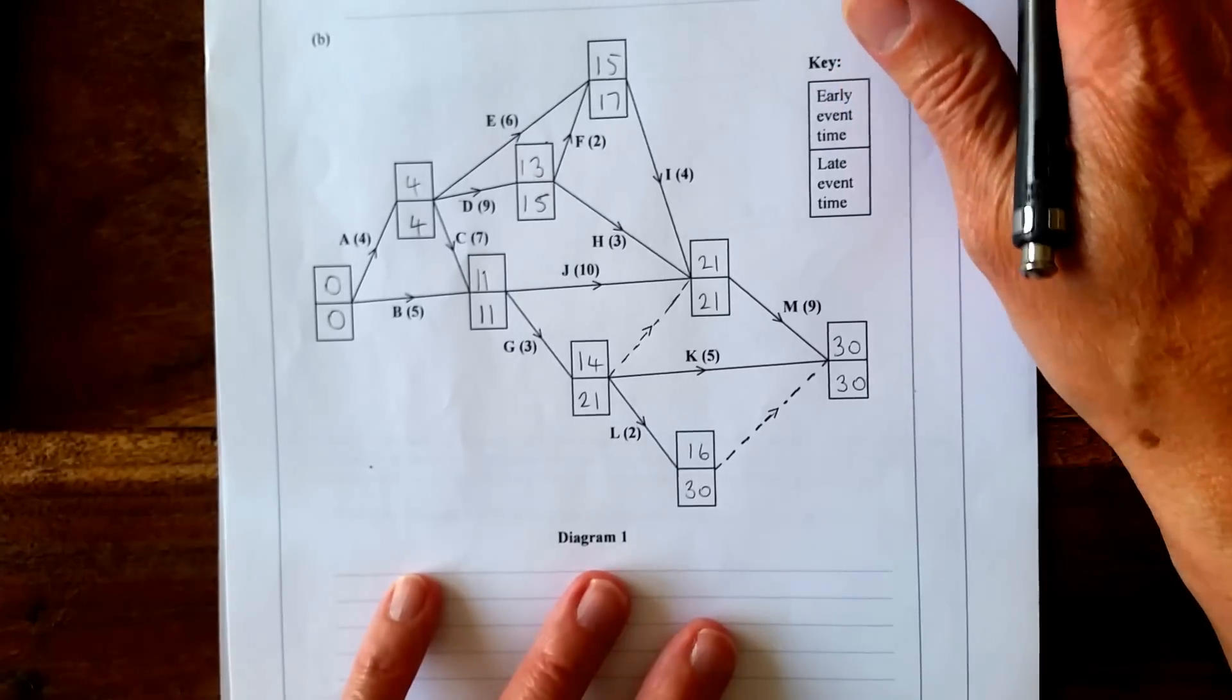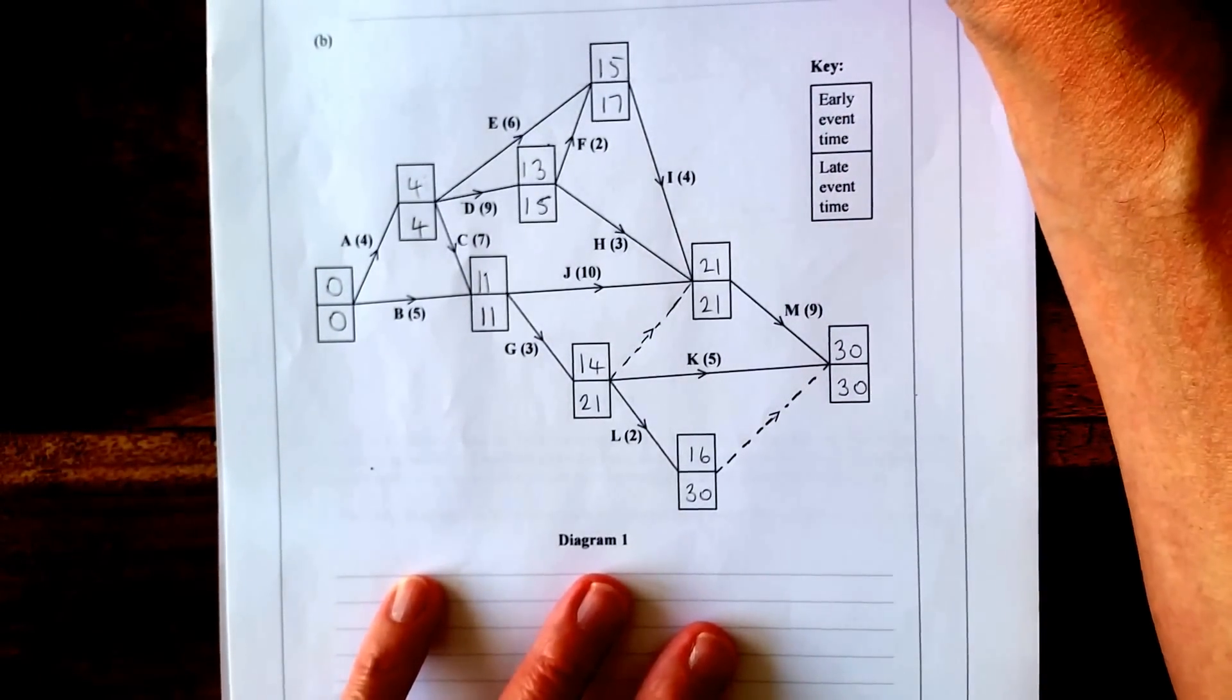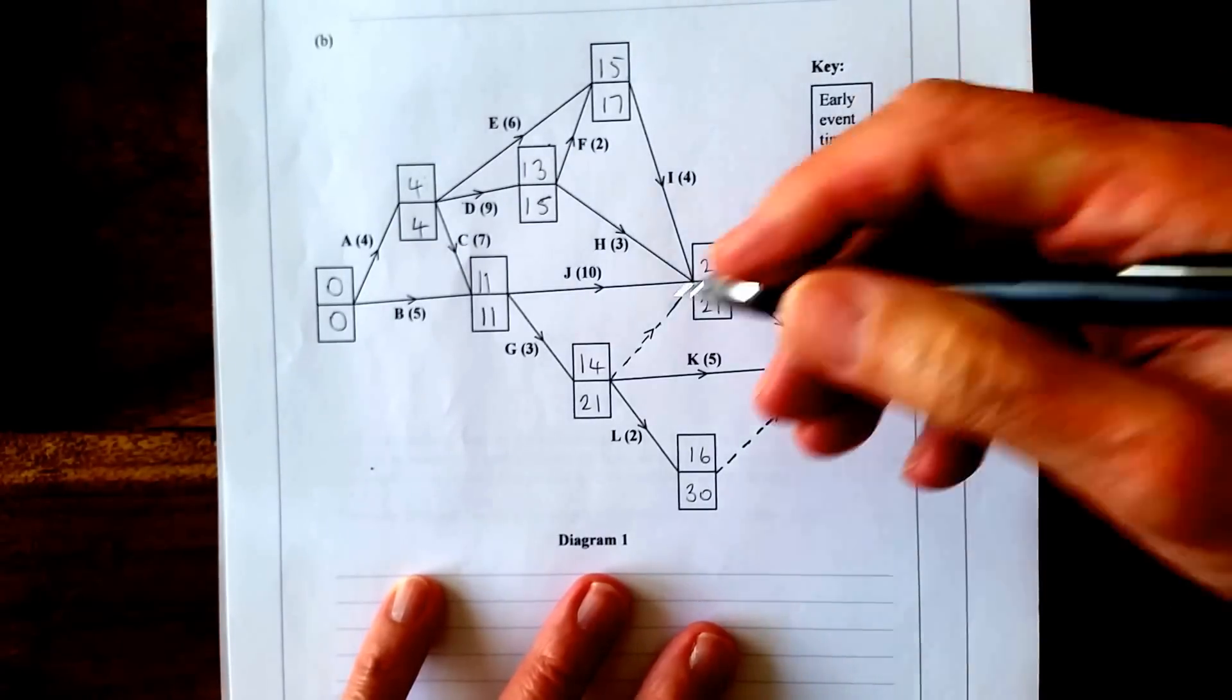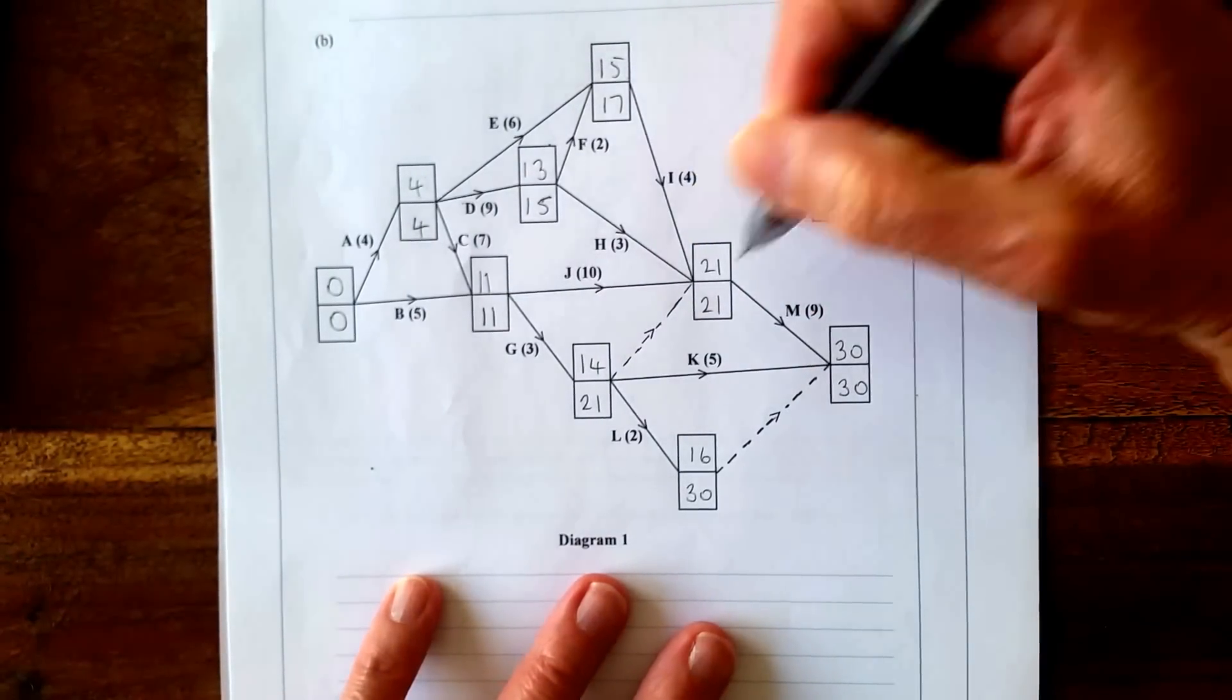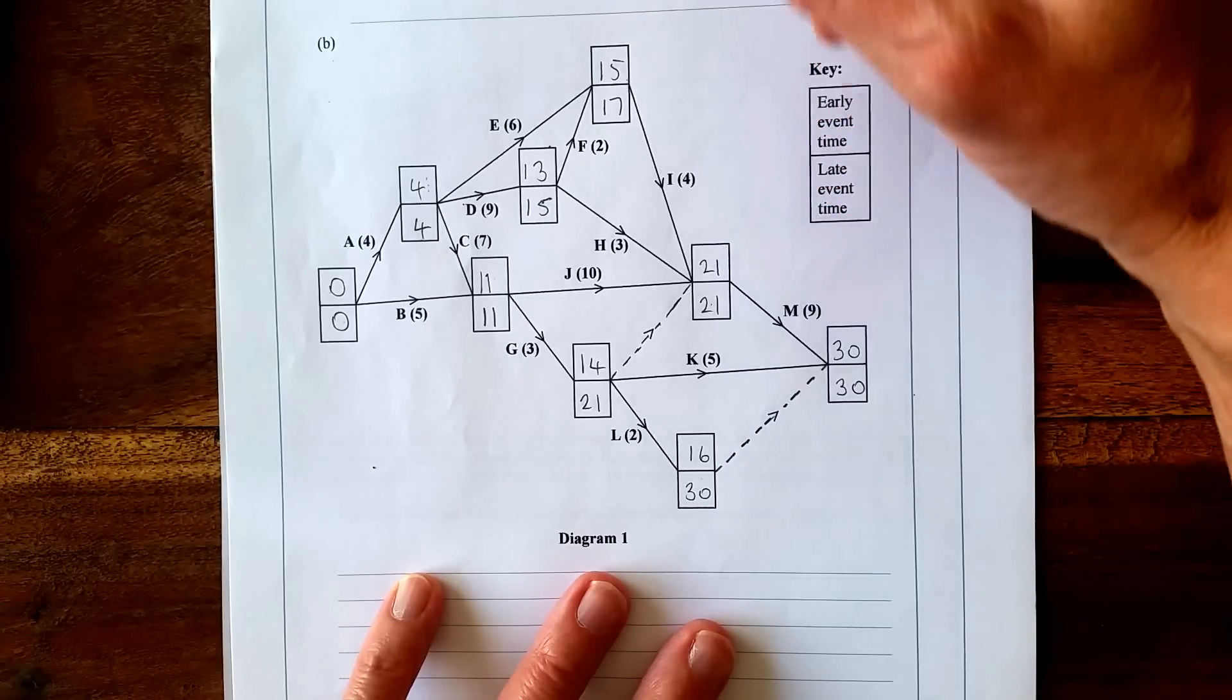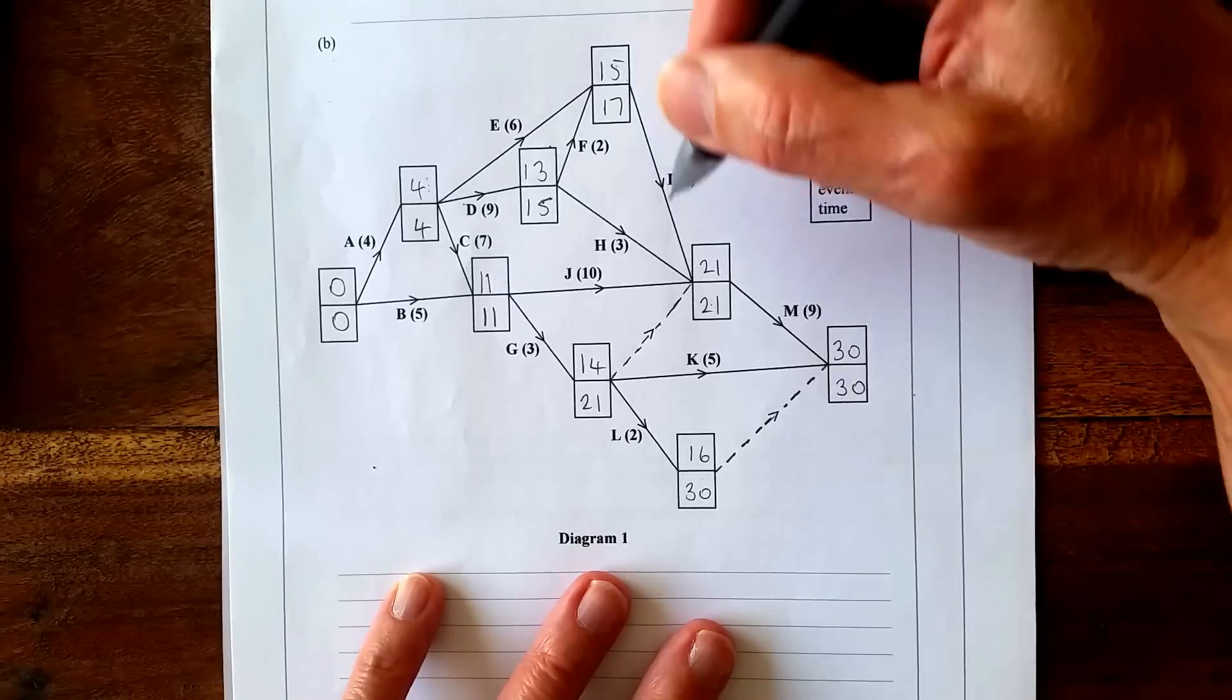OK, that's our part done. Now let's go back to the first part. It says in the context of critical path analysis, define the term total float. So if we look at something like this one, we've got 21, which is the late event time, subtract 4, which gives 17, and then we subtract 15, which is the early start.